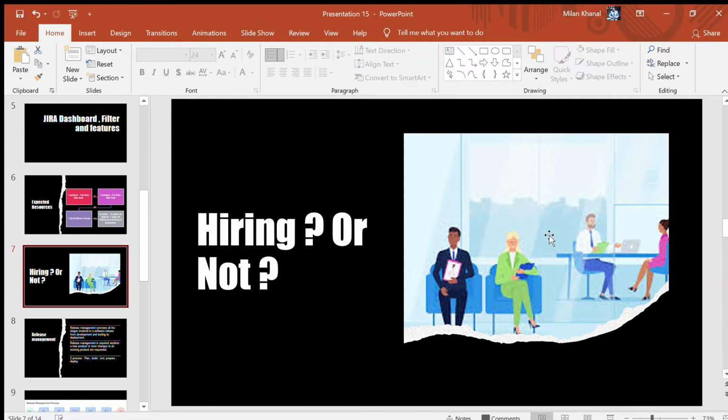If there is any project in the pipeline, we should always be aware that we have enough resources available for the project. If not, how can we manage it? If hiring is a viable option, if switching some developers to the new project is a viable option. We need to think in terms of that, and these things should come up in the pipeline phase, before we start the project. So this is how we tackle this situation.